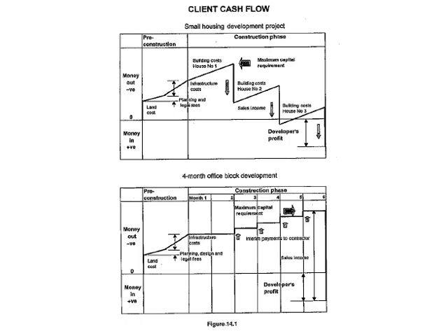You will see this is a small house development. The example of this is on page 302, and here you can see you've got your land cost, then your preparation of legal fees and so on, then your design costs. Then you actually appoint the contractor, so you have a constant outflow up to the point where you can actually sell that house, and then your deficit goes down, and then you just have your construction cost again, and it goes down again, and so it goes on. In this range here is where the client actually gets his income.